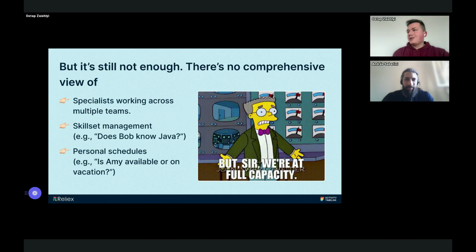And also it doesn't consider personal events, vacation, holiday, sick leave. These are all events that influence the capacity, and so subsequently they influence the delivery of the project. So you cannot disregard them. At least, let's say in the scope of 1 month, 2 months, a person taking one week of vacation really makes a huge influence. And if we extrapolate, let's say we have 1 year, there are 50 people, and they all take 2 weeks of vacation.